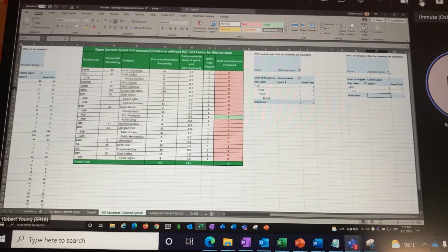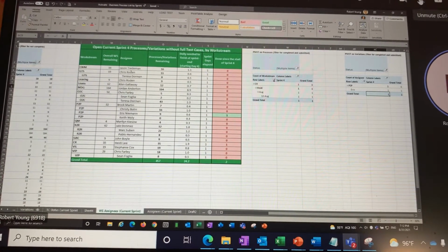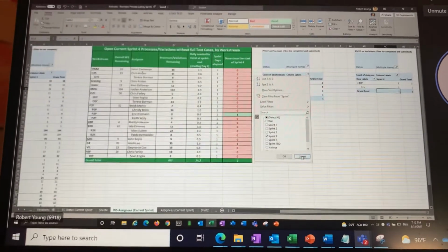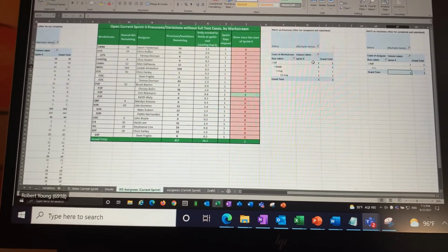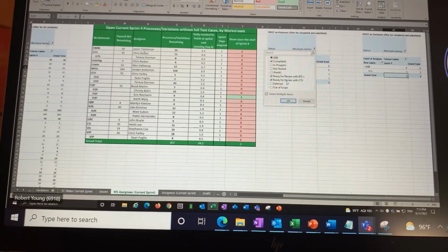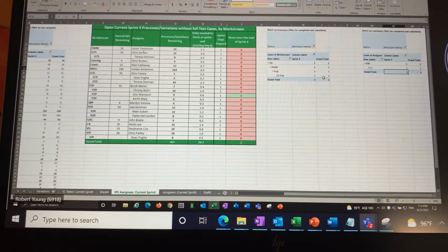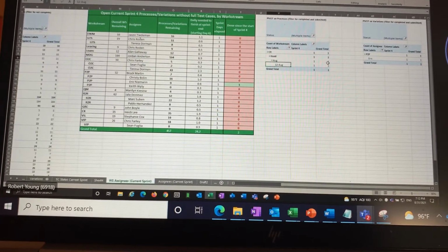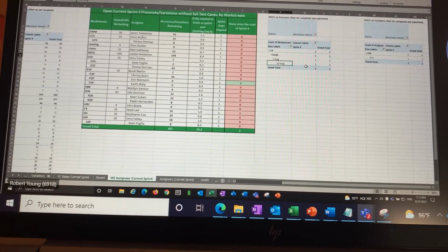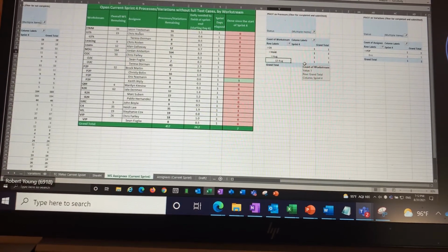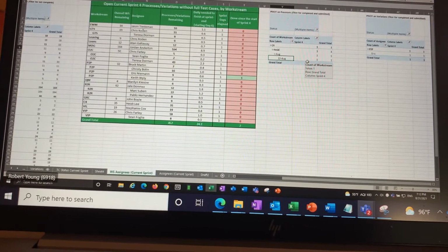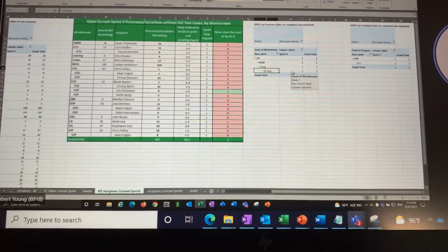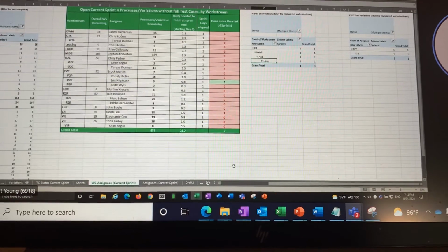Oh, I see why I don't have a date restriction. I remember now, because it's only looking for what is sprint 4. So this is what is in a completed or ready for review state. That's in sprint 4. Heidi has 1 and Eric has 1. As I mentioned, it's finding that Heidi completed a sprint 4 test case for her process on August 12th. That is outside of our sprint. That's before our sprint started. So that should answer that.